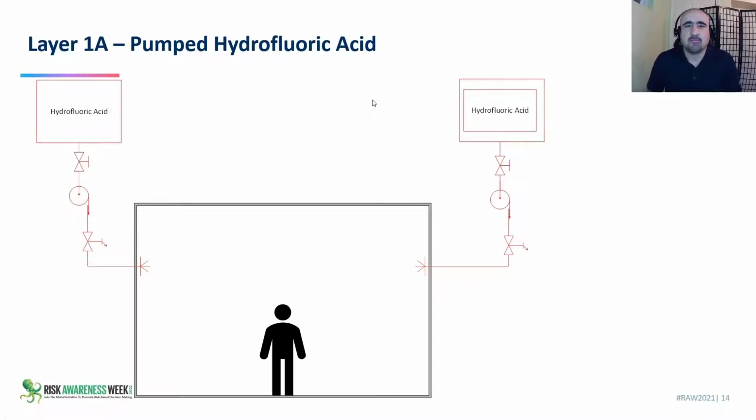If we were doing a very thorough process safety risk assessment, we'd be breaking down all those components by failure mode, evaluating the likelihood of each of them failing. So we'd be listing things like reservoir leak, manual valves kept closed by human error. We'd put maybe signal not reaching the relay, valve not operating, clogged pipe, burst pipe, failure of the electrical system. We'd take a look at all those failure modes and their likelihood and their cause, and we'd be digging very deep. Now we'll keep this high level.